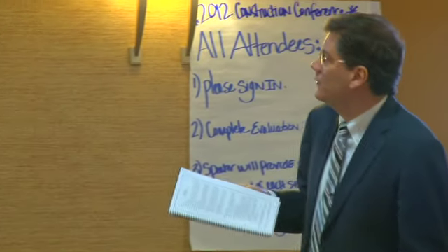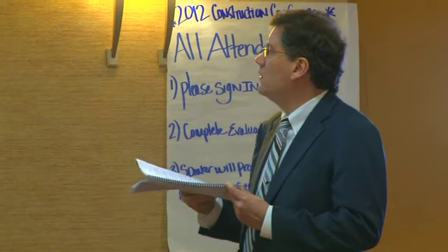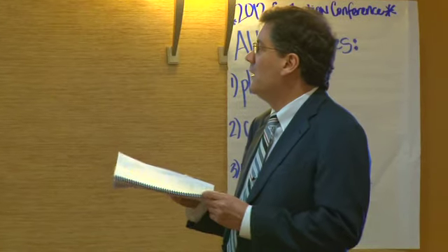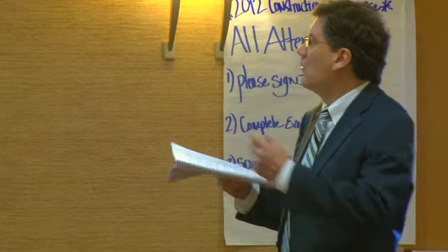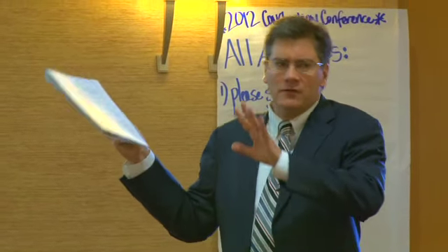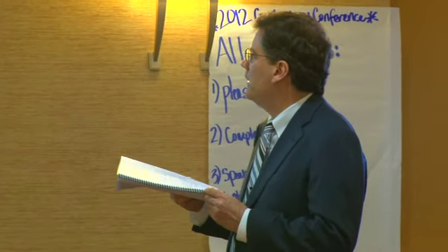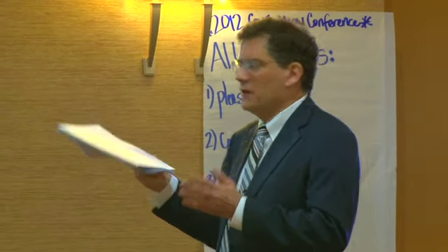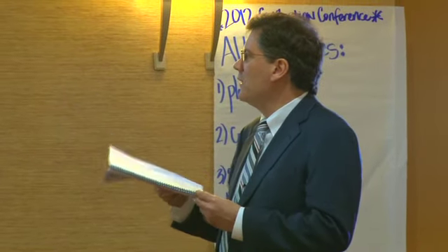What information has to be in there? It's signed by the claimant. All right? It's a description of what you supplied. It's the name of the person to whom these materials were furnished. It's the name of the entity. It's the amount and value of those materials already furnished and the total amount agreed to be furnished. So there's a little bit of arithmetic coming up here in the next bullet point. The amount of any payment received by the claimant for the labor and materials furnished, and what's left to be paid. It's the same thing. What am I owed? And the name and address of you, the claimant.